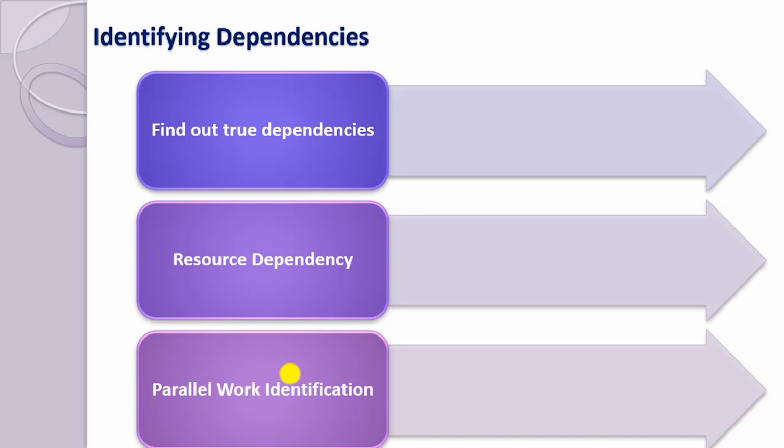Dependency identification can help you recognize holes in your initial breakdown of deliverables. It's only when we look at the dependency for each section that we realize that we haven't actually got the site design in the plan. Certain times when we identify the dependency, it's very important to know we can just find out the loopholes in our project.